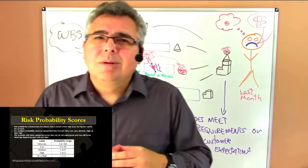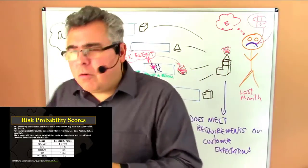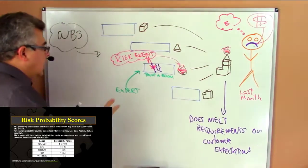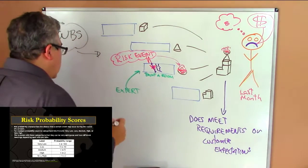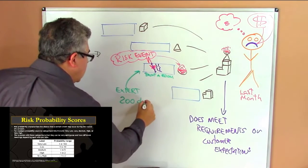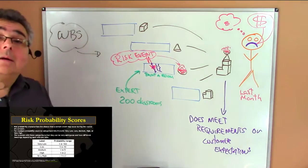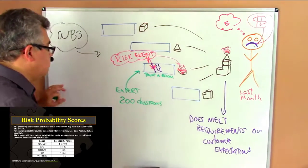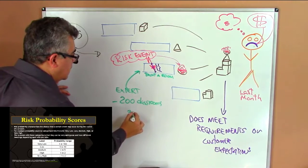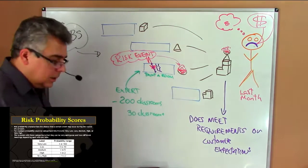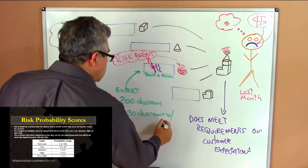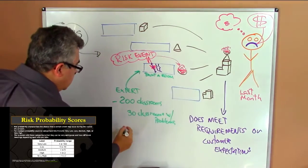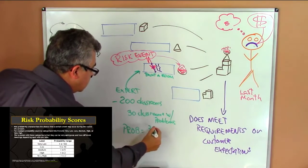You have to go to the second question: try to understand the probability of finding that kind of problem. The way we can do it is to ask the expert — the painter — how many rooms or classrooms have you painted before? He says he painted 200 classrooms in his life. Then you ask: how many problems like this have you found when painting those classrooms? Maybe in 30 classrooms he had problems. That's 30 classrooms with problems out of 200. What is the probability? The probability is 30 divided by 200.